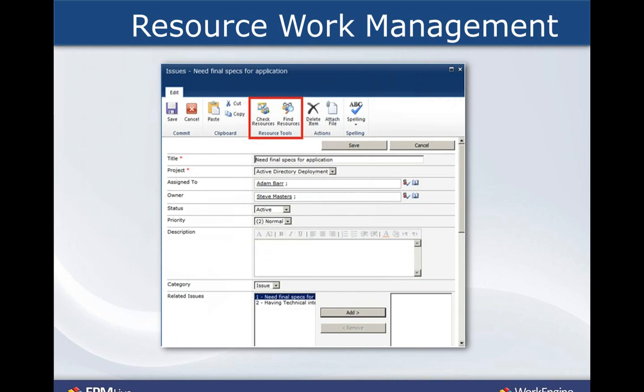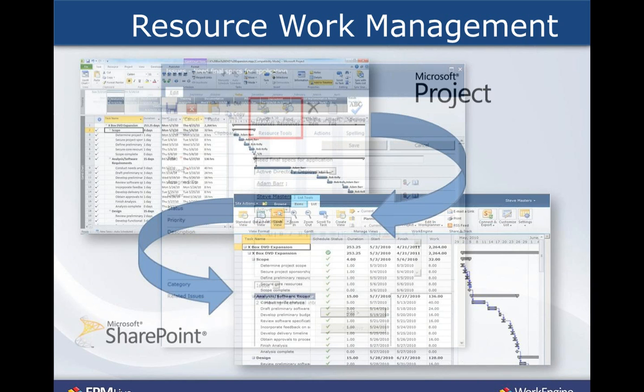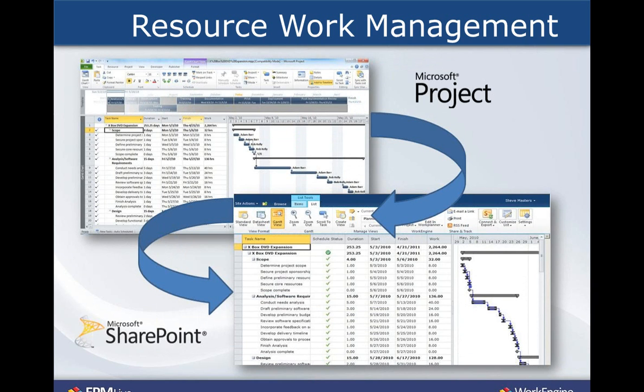The same thing would happen with Microsoft Project. Our Project Publisher, like I had mentioned, would allow you to build all of those details and all those tasks in Microsoft Project and publish them and have them not only viewable in SharePoint, but have them available for your team members to interact with that data and provide updates out in that collaborative SharePoint-based environment using our WorkEngine tools, and then have Publisher bring those updates back into Microsoft Project via the project manager's approval. It's a really nice closed-loop process, as we say, feedback, feed out and communicate to your team and then get feedback.